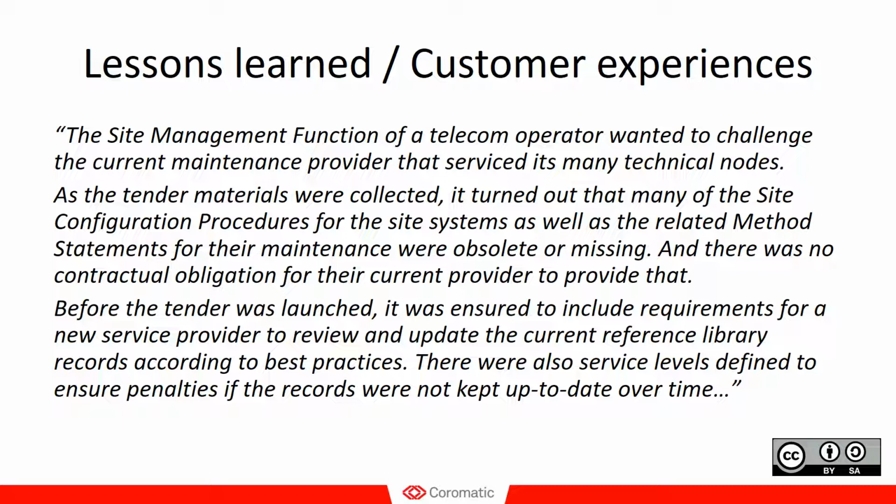And they also reminded the telecom operator that there was a tough negotiation during the tender for this maintenance contract a few years back, where there was a strong focus on price. And this was one of the areas where the supplier could save some costs, but expected the site owner then to take responsibility for this. Now, the site owner did not have the competence or capacity to do that.